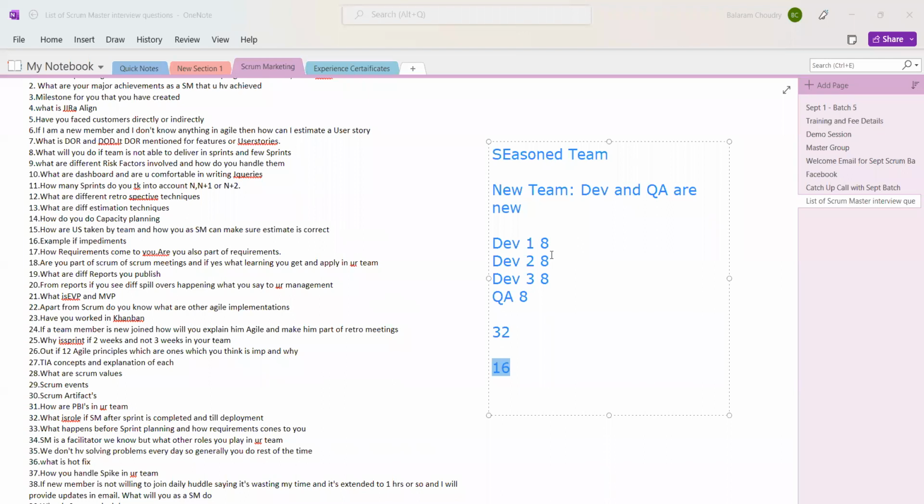Understood, Ravi? Yeah, now I understood. Thank you. You have to load the work only for 50% of the total capacity, so that you start with good breathing space.